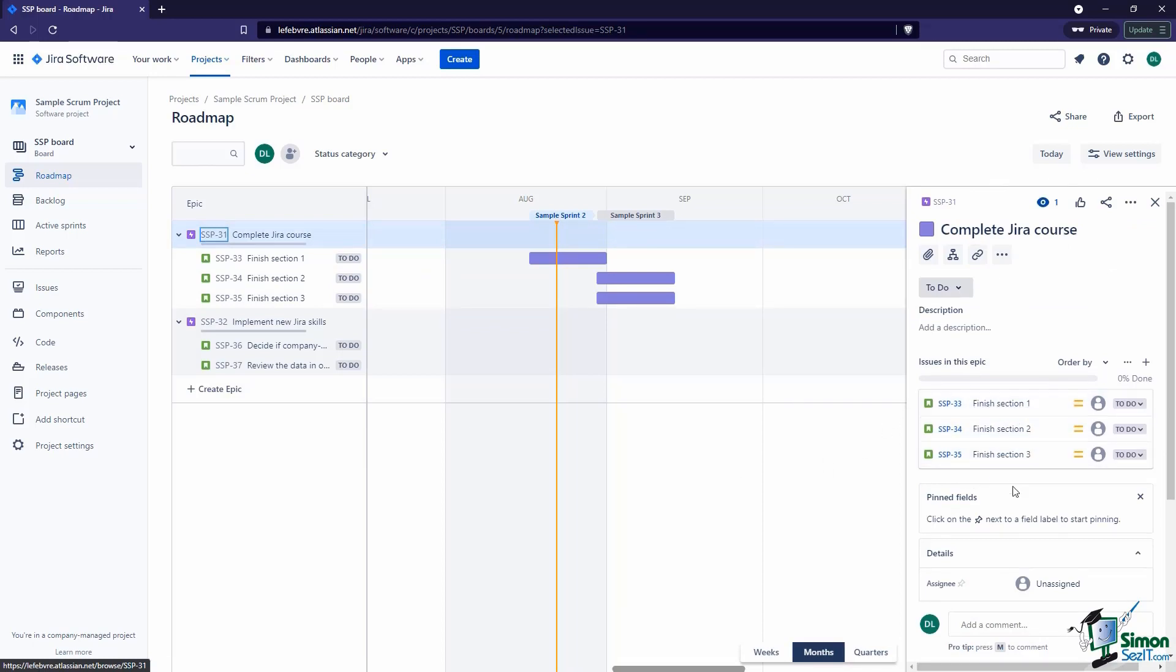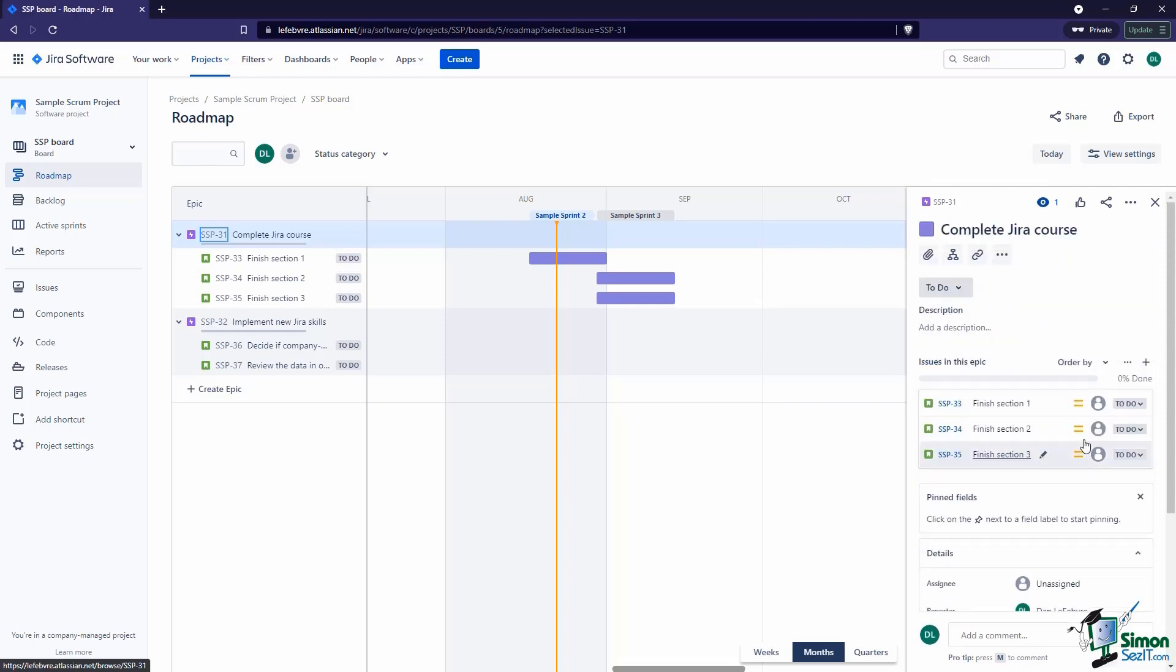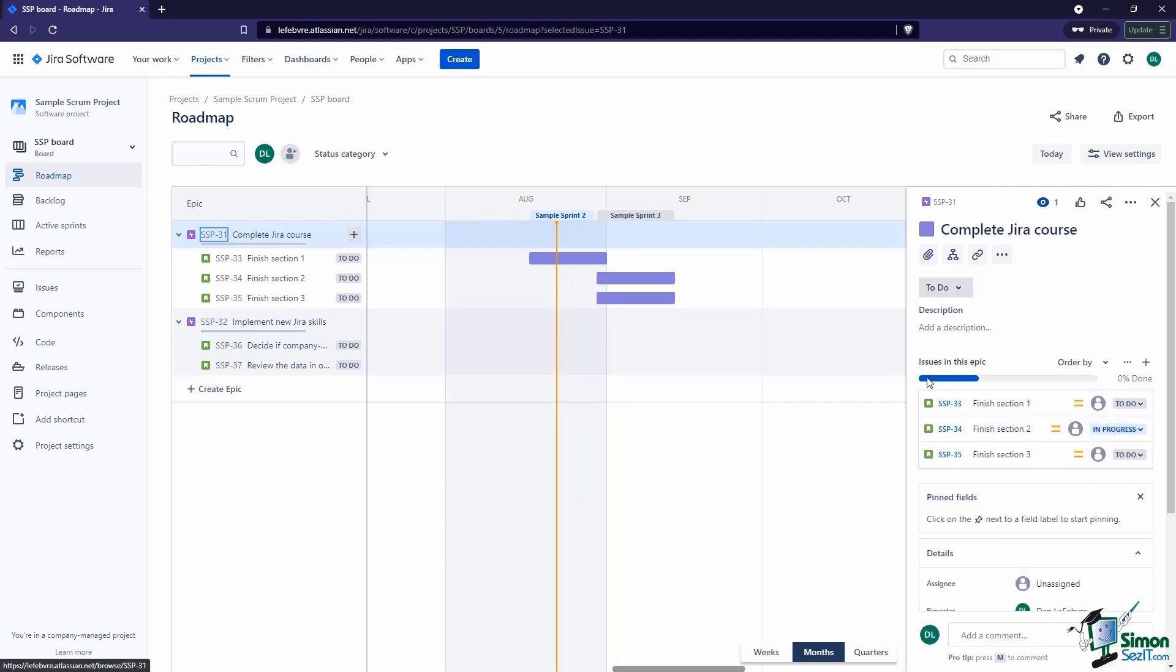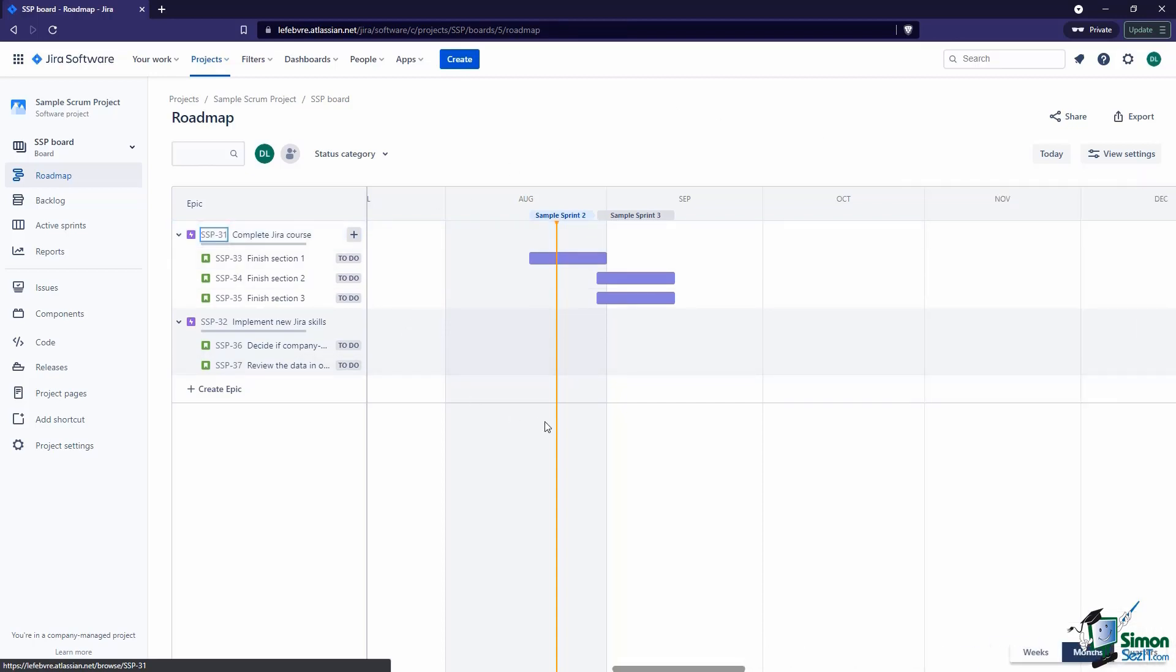You can hop to those issues. Just like any other issue, you can have your comments and be able to interact with your team to see how things are going. You can start to see, maybe this one is in progress, so you can start to see the progress for the overall epic. As this one's done, okay, now one out of three—it's 33% done. So we can start to see the overall progress on our bigger projects. Remember, epics are bigger projects, and the roadmap is really a great way to be able to visualize those and the work being done.